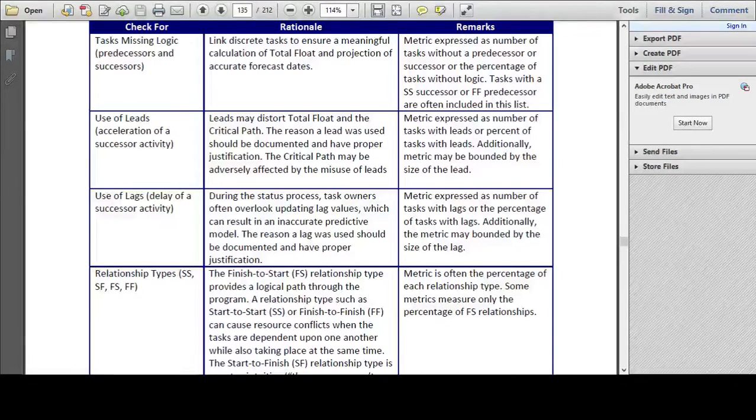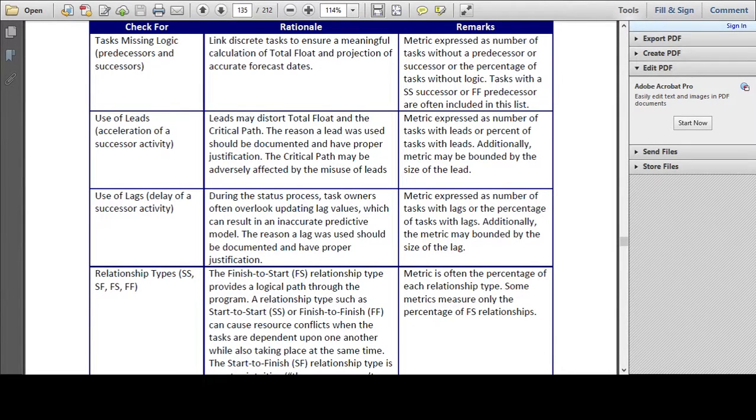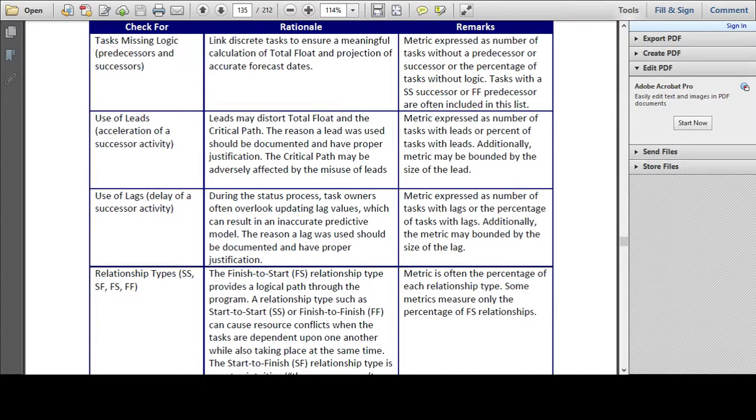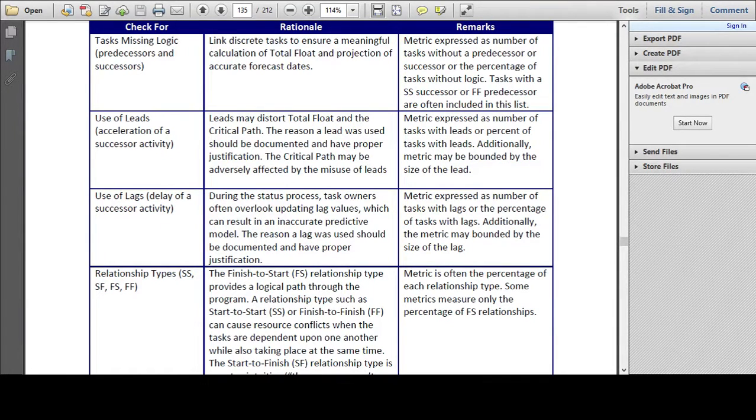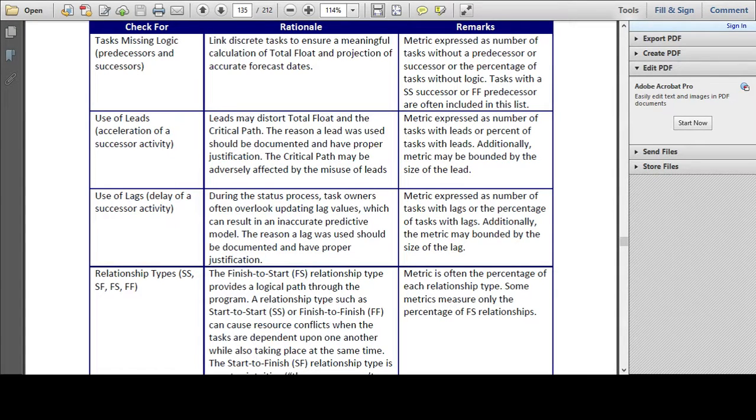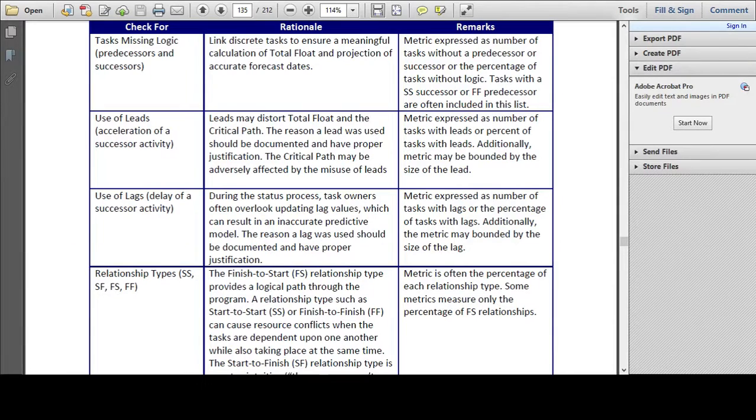Just as a footnote to this, Project can't of course tell us if the dependencies that we have set are correct or not. What we are looking for here are activities which are isolated from the remainder of the activity network, and situations where, potentially, the assignment of activity dependencies has been missed.